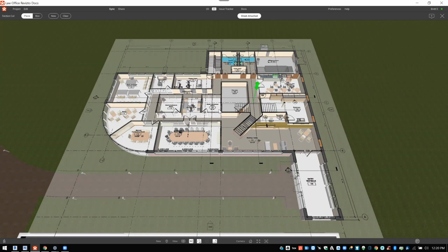So when we're talking about construction, if people are issuing new sheets and they are doing things like changing dimensions on modeled elements or anything like that, which causes huge problems in the field, those are actually going to be highlighted here now, because the sheet is going to have that essentially fudged dimension, and the model is going to reflect the model that's still coming from the other environment or from the Navisworks or the Revit environment. So a really great way to compare what your model is looking like in comparison to what is actually living in your CDE and is actually contractual.